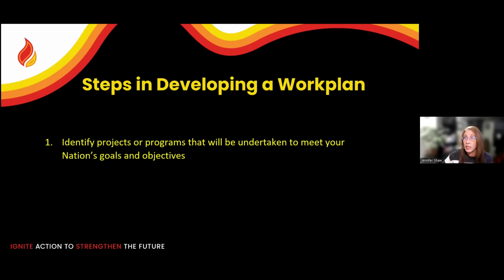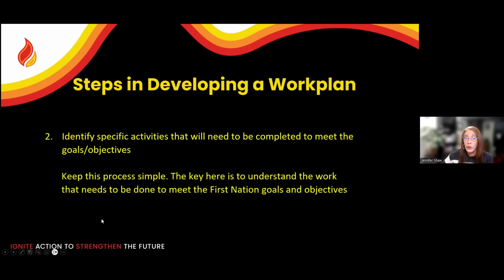So the steps in developing a work plan: number one, you're going to identify the projects or programs that will be undertaken to meet your nation's goals and objectives. Number two, you're going to identify the specific activities that will need to be completed to meet the goals and objectives. So keep this process simple. The key is to understand the work that needs to be done to meet those First Nation goals and objectives.